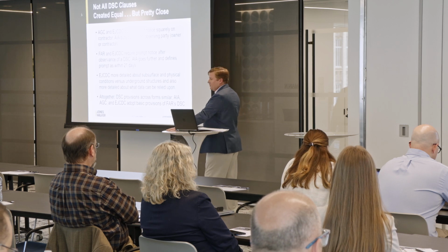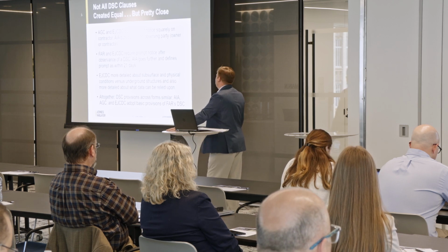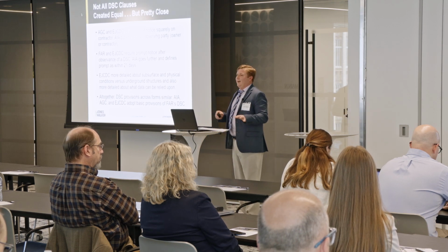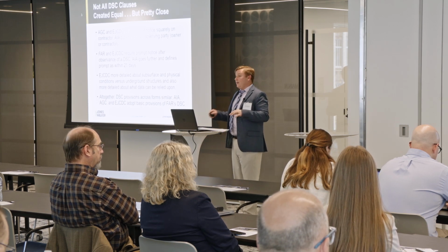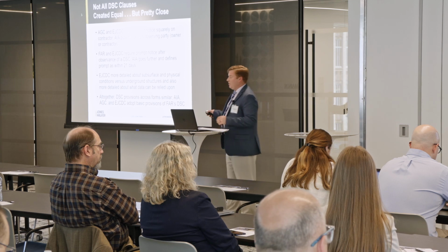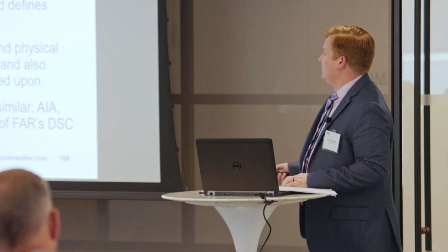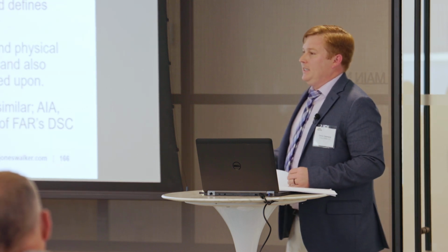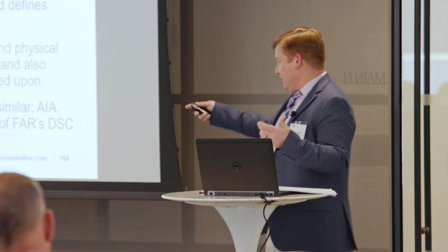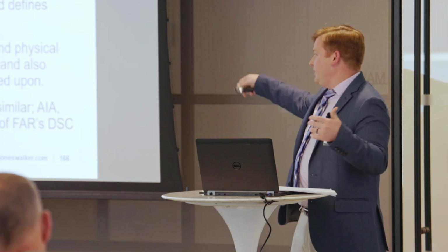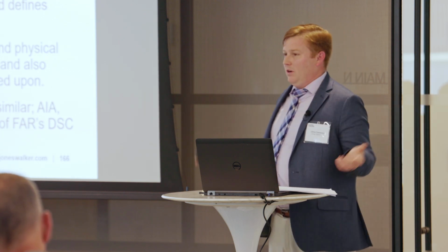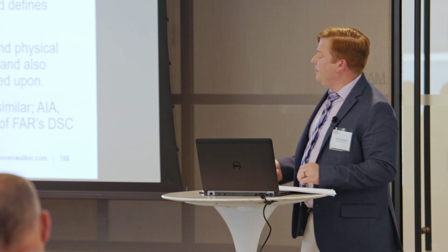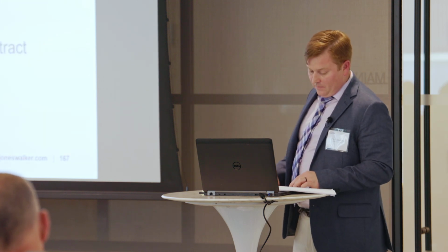It's more detailed about the subsurface and physical conditions versus underground structures, and it's also more detailed about what kind of data, technical data or non-technical data, can be relied upon to determine whether or not there's a different site condition. But this last note, basically, the DSC provisions are all born, at least from the AIA, AGC, and EJCDC, out of the FAR clause. So again, they are pretty similar.